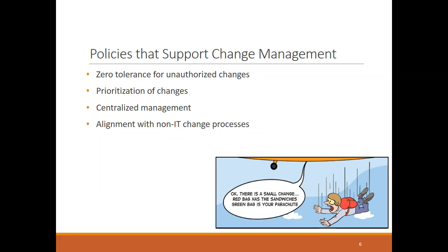It's mentioned in the video, but we've got a slide here where it talks about the four R's. According to the four R's, which is who requested the change, et cetera, we'll see all those. There's seven of them actually. Depending on that, we determine a priority. The priority will also relate to a quadrant of importance and urgency. Is it very important and is it very urgent? Then the priority is high. And so we'll talk about that too. But according to the priority, the higher the priority, the sooner we fix and do those first.